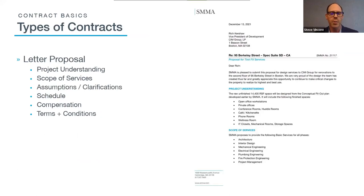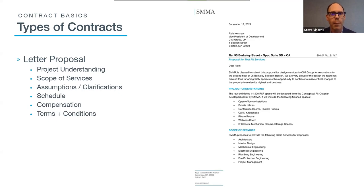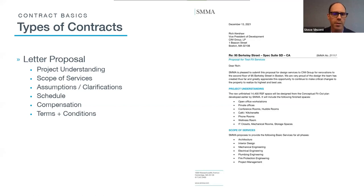Different types of contracts: a simple letter proposal outlines the project understanding, the scope of services — what you're doing in each phase like schematic design and CA — any assumptions or clarifications (for example, we're locating card reader back boxes and conduit on plans but not designing the security system), the schedule, your compensation — either fixed fee or time and materials — and lastly attaching your terms and conditions, which is very important.